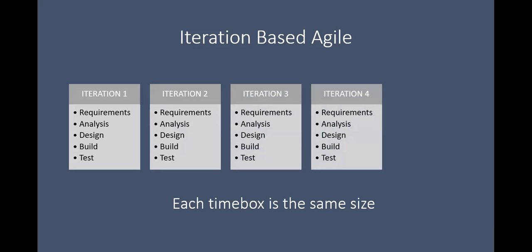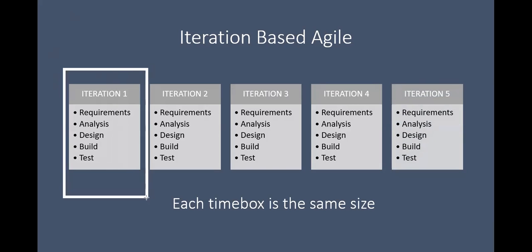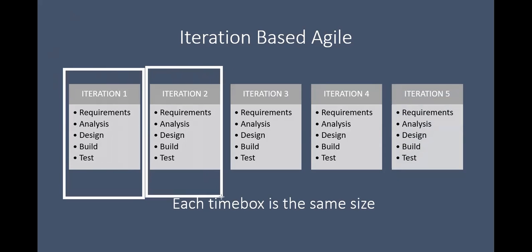The team may decide to work on a few features at a time. The team does not address all of the work for the iteration at once. That is, it does not address all of the requirements, followed by all of the analysis, and so on. No. So even though we have lingo from the software development lifecycle world, we're not saying all of these follow each other in strict rotation. Instead, what this is meant to convey is the fact that the work done in each iteration, while delivering value, does it in a time box of equal value, iteration by iteration.